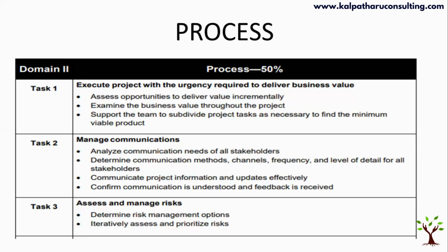And then we have perform qualitative risk analysis, perform quantitative risk analysis. Through these two steps, you are going to prioritize the risk and then plan risk response. So you're going to plan what actions you are going to take to manage each and every risk. And then you're going to implement the risk response during the execution. It doesn't stop there. You're also going to monitor risk to check, is there any new risk coming up in the project? Is the priority of the already identified risk still effective? Are the action plans which you have planned for those risks still effective?